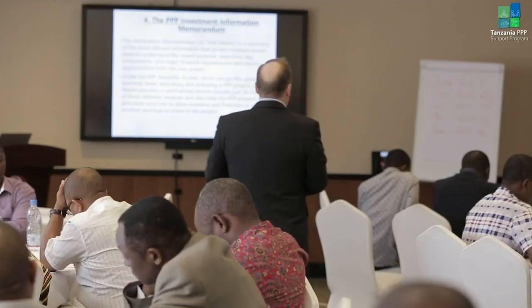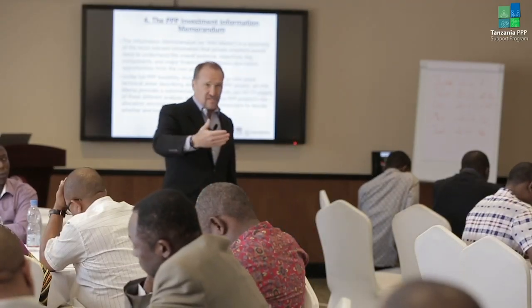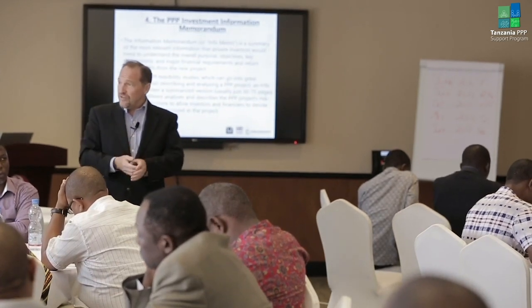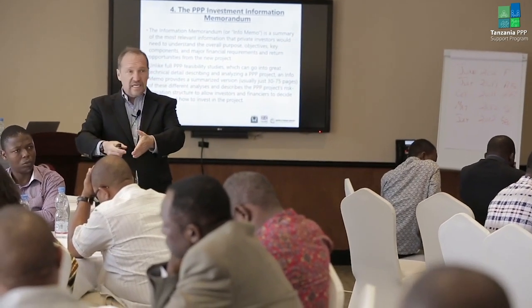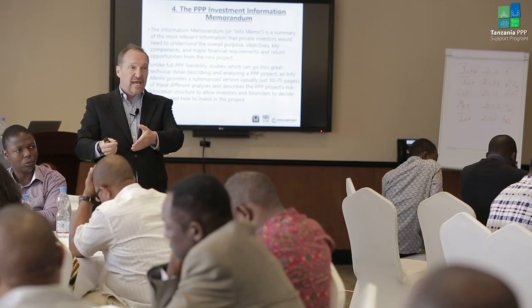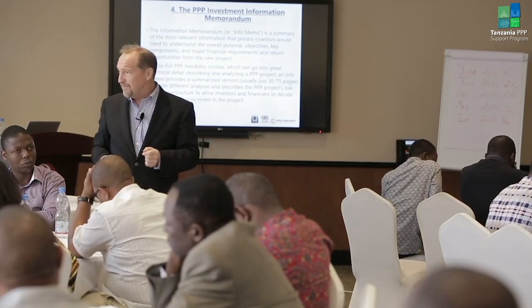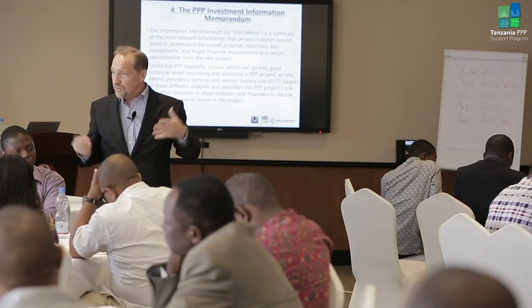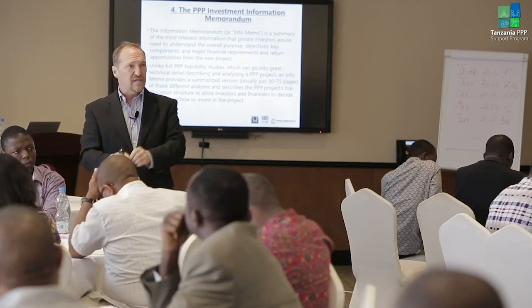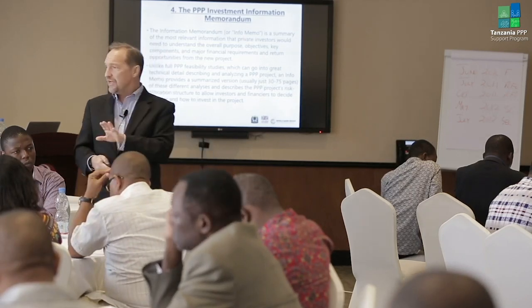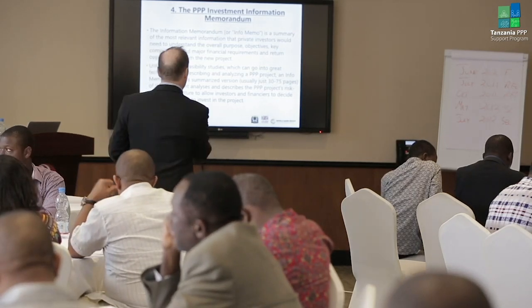Give me something that I can read in one sitting, and give me something that explains basically what the whole structure is about, so that I can decide, do I now want to pursue the opportunity and even hire people to help me prepare my bid, partner with firms? Do I really want to spend more money doing this, or do I want to pass on it? And that's what an information memorandum is designed to do.